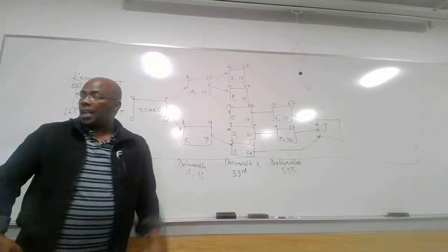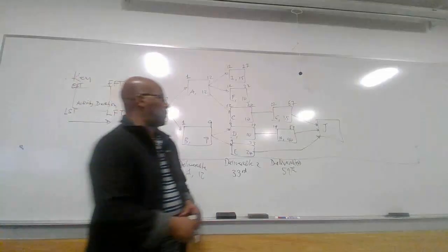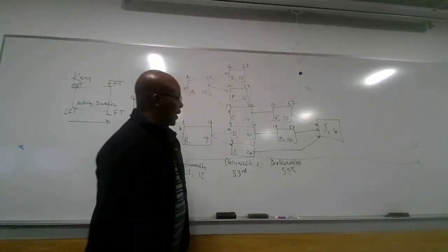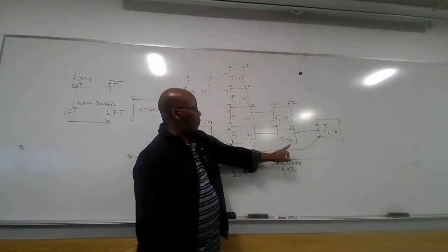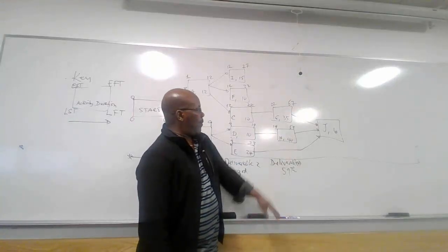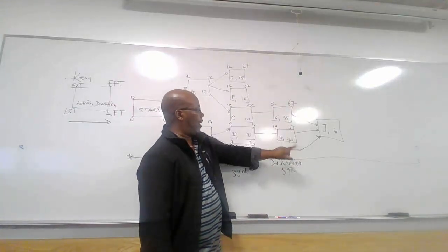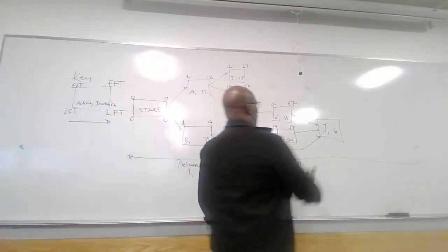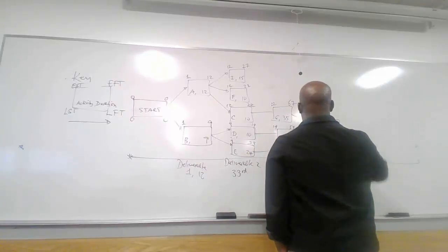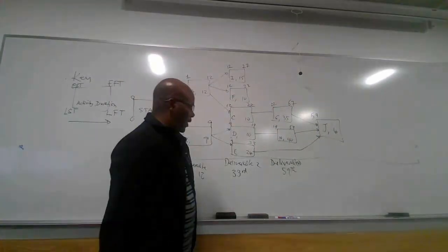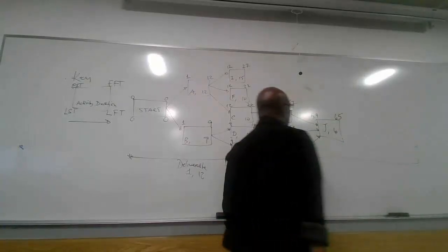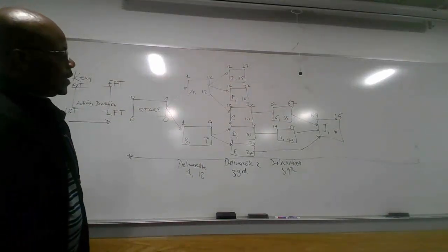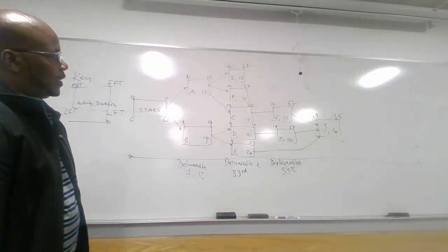And so J has how many? J has 6 weeks. And this one will start not on the 57th, but on the 59th. Because this can be completed, but still J will wait for the 59th week to complete. So this one will start on the 59th, and then it will complete on the 65. So up to the 65th, that's where we can finish J.